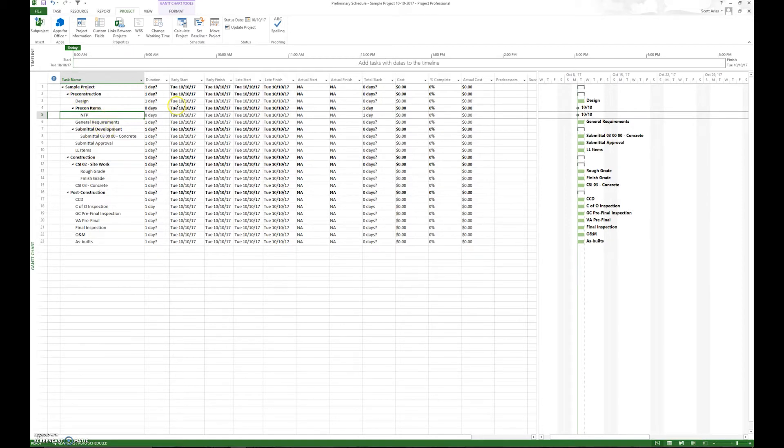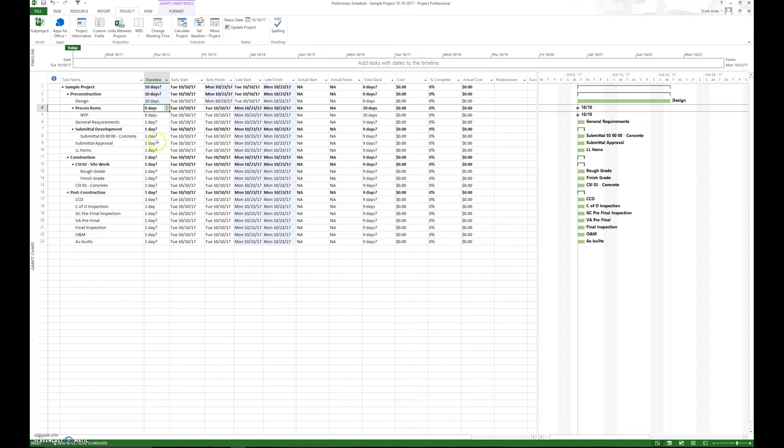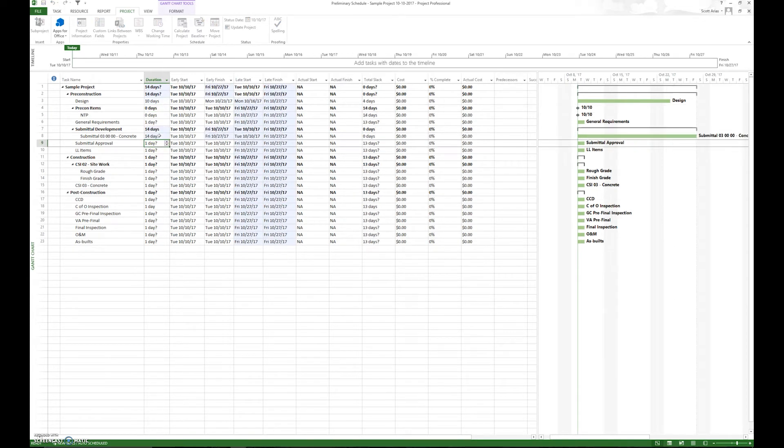Simply what we have to do once we identify all the tasks is we just drop in under duration how many days it is. Design, 10, submittals, concrete, 14 days. So we're going to go ahead and do all the individual durations.